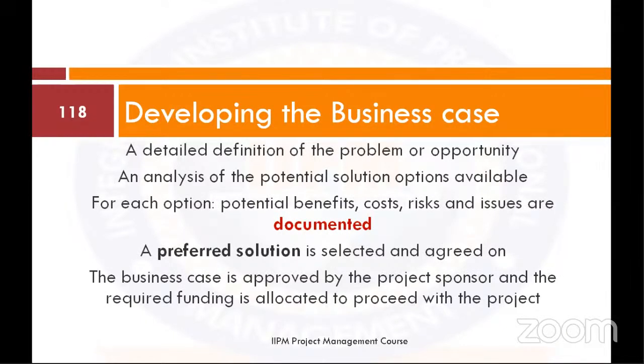A detailed definition of the problem or opportunity, an analysis of the potential solution options available. For each option, potential benefits, costs, risks, and issues are documented. A preferred solution is selected and agreed on. The business case is approved by the project sponsor and funding required is allocated to proceed with the project.